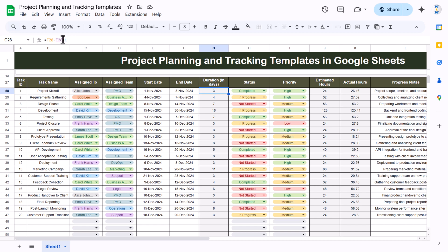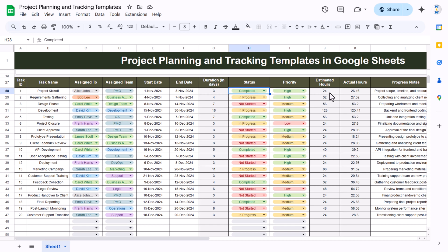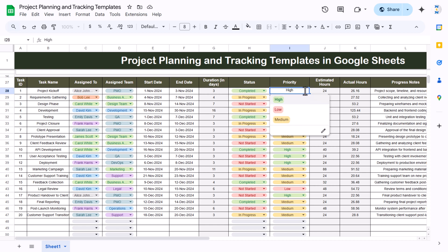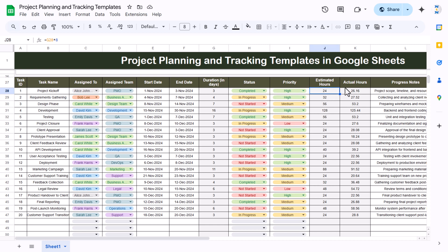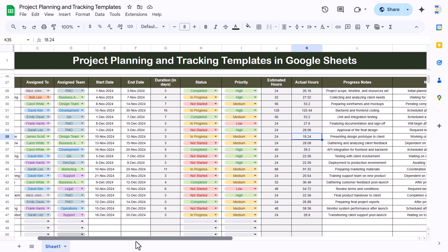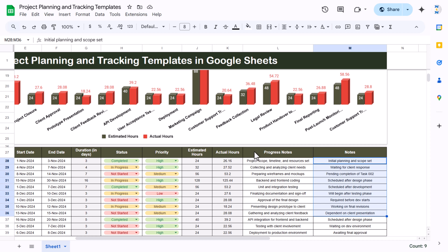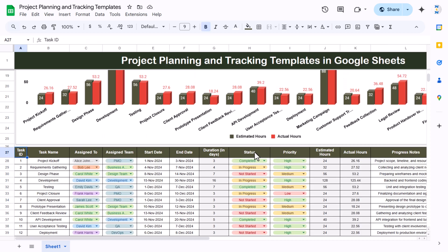This is the start date and end date. This is the duration, where we have used the formula: end date minus start date plus one. This is the status, which is a drop-down. Priority is high, low, or medium — also a drop-down. Estimated hours is duration multiplied by eight. Actual hours you have to enter manually, and then we have progress notes and general notes.